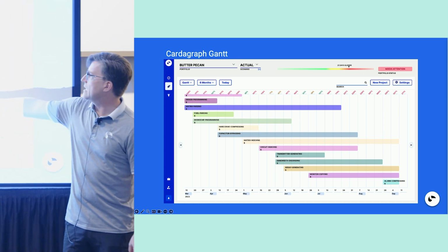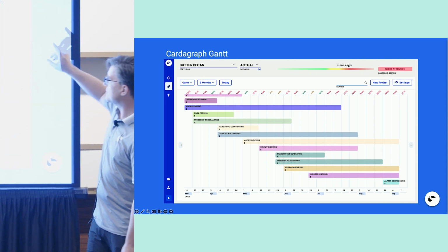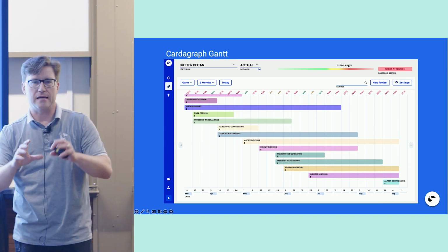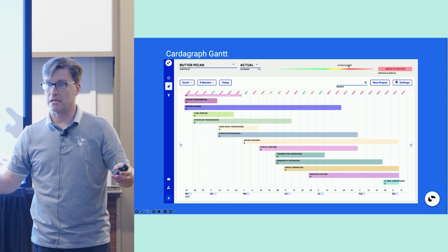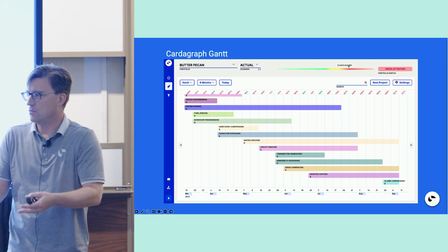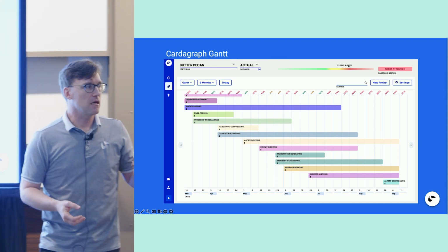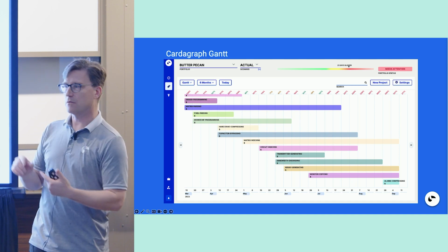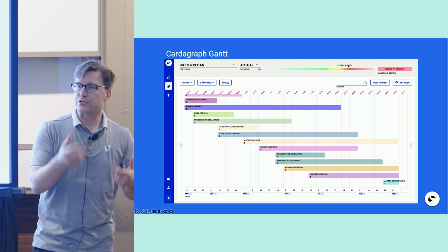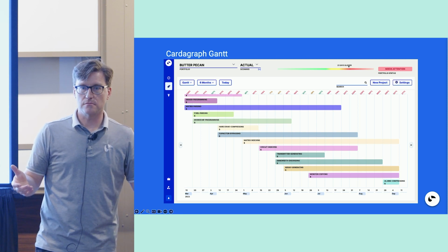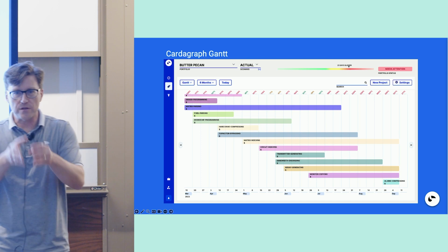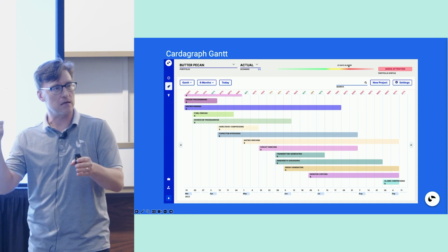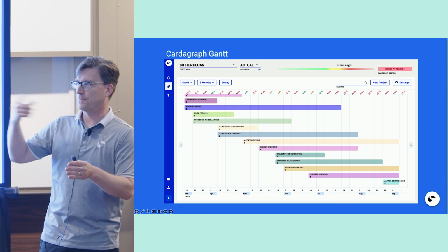But in a future project, you come out here and click, and you say, I want a new project out here in the future. You put in the project name and say, okay, it's going to be about this big, t-shirt size. And I'll tell you approximately how long it'll take you. You can tell me how many resources you're going to put towards it, and I'll say, oh, cool, then you should be able to move through it a little bit faster. If you're not very certain about it, I'm going to lengthen it out. If you're very certain, like you know you've got the solution and you're going to nail it, you've got the design, then I can shorten it because it's not going to take a lot of iterations through development and testing, right? Through those processes.